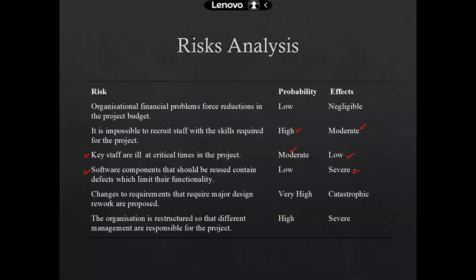So it totally depends on how you evaluate each and every risk. So I would strongly recommend that you list down all the risks, and once all the risks are listed down, you should define the probability of occurrence of that particular risk, and the impact of that risk on your project or your venture, right?